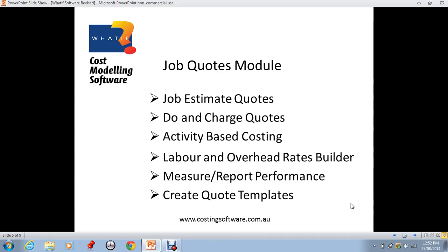and shown on the quote in terms of their quantity, price and value. In both job task type quotes and due and charge type quotes, the module produces costs that can be calculated using activity-based costing principles, using in turn identified job cost drivers. Estimated costs then generate prices and values using target markups which can be overridden by you.